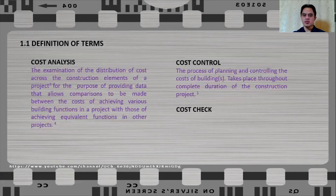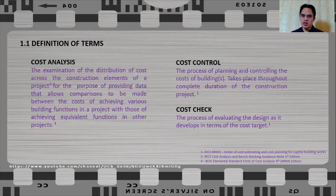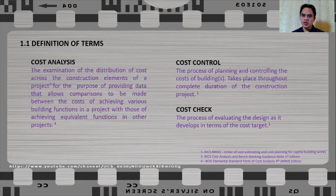Cost checks is the process of evaluating the design as it develops in terms of cost targets. So every stage, when there is a new design development, you are going to assess the cost of this new design development with respect to your cost target. That activity is called a cost check.